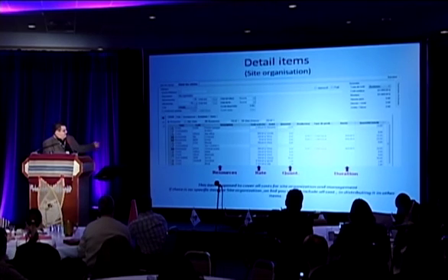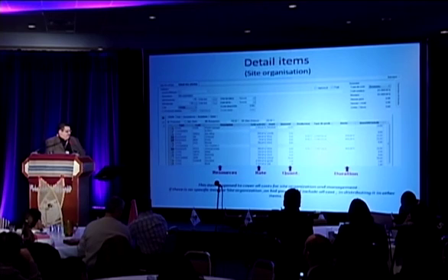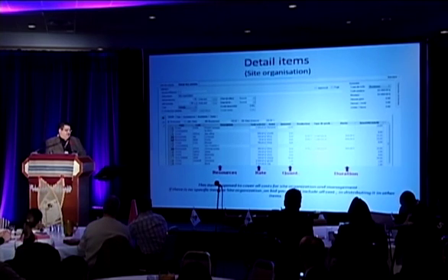So these are two items. In the note, it summarizes that this item is supposed to cover all costs for site organization and management. If there is no specific item for site organization, once again, you should include all costs by distributing them in the different items.